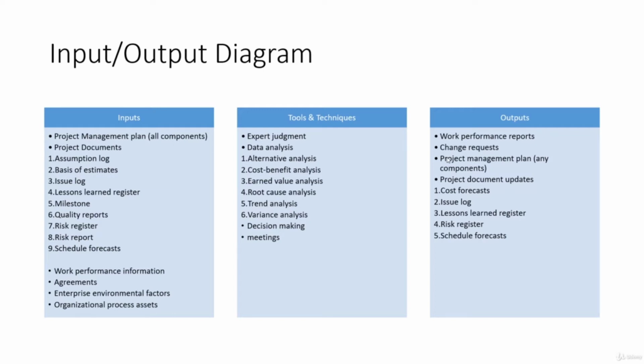And now let's say there's a variance in the requirements. The stakeholders are asking you to develop something else. If you are tracking your project activities, you can simply raise the concern that this was your initial basis for estimation, and if you are deviating from that, how that is going to impact the project.